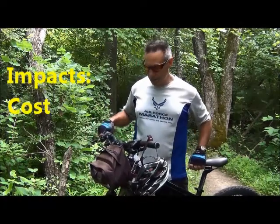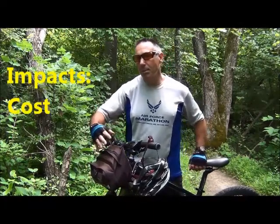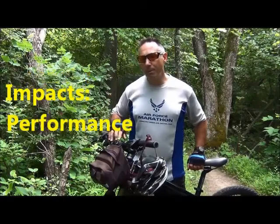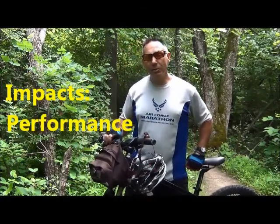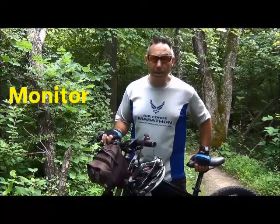It comes at a cost. Each one of these things costs money. It comes at a performance cost. Now I've got to carry this extra weight. I've got this extra weight up front. So any kind of risk you're looking at, look at your risk mitigation strategy in terms of what it costs in cost, schedule, and performance. Lastly, I've got to monitor my risk. So that's the last step.